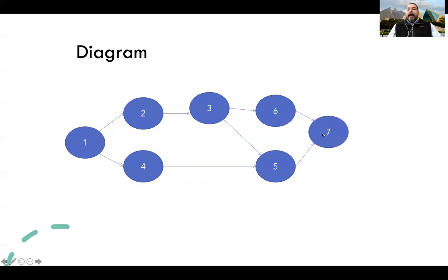And I have a flow of activities, the sequence of activities that we need to do. We need to start by number 1. Then we can continue in parallel with number 2 and number 4. This is useful in projects. So when we go to the chronogram of activities, we can see which activities can be done at the same time. And this is important because every activity is going to need resources. And as a project administrator, as a project manager, I need to manage those resources needed to perform activity number 2 and activity number 4 at the same time.